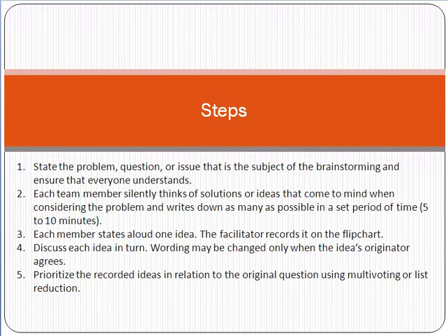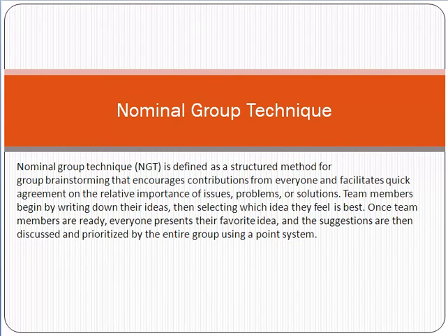And one by one every person can come, and you can give scores, or as a group you can give scores and points to the thoughts and ideas. And after that, based on the collective scoring or weightage, you can take a decision about the problem. So this is called the concept of the nominal group technique.